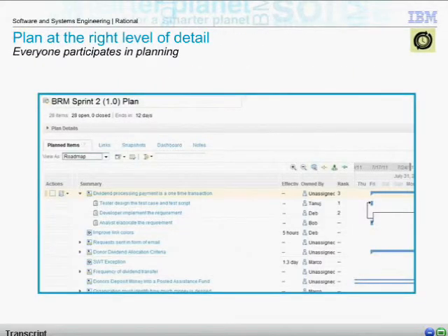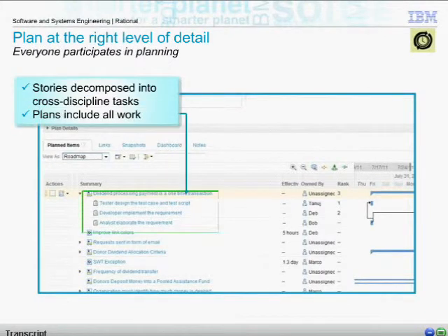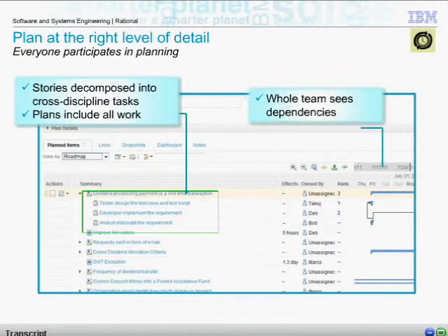So here we're showing this Agile team, as I was starting to say earlier, where the designer and implementation tasks are under a single story. So now if the story is changed, that is, for instance, moved to another sprint or iteration, the team members' work with their dependencies can easily be adjusted accordingly. And here we're just emphasizing those dependencies.